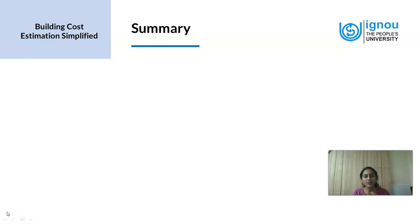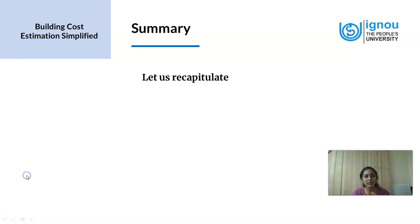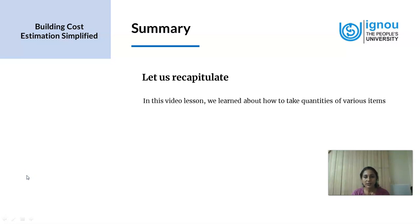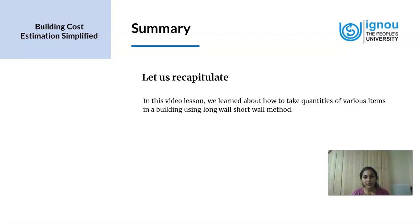So we come to the end of today's video lesson. We learned about how to take quantities of various items in a building using the long wall short wall method. We found how this was more accurate than merely taking the perimeter dimensions. We also learned that in order to find the quantities using the long wall short wall method, we need to first locate the center line of the building, and all references are made from the center line.